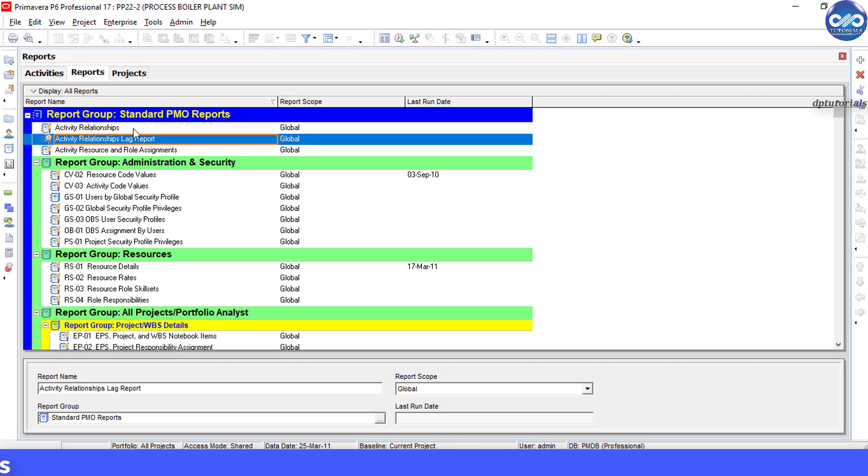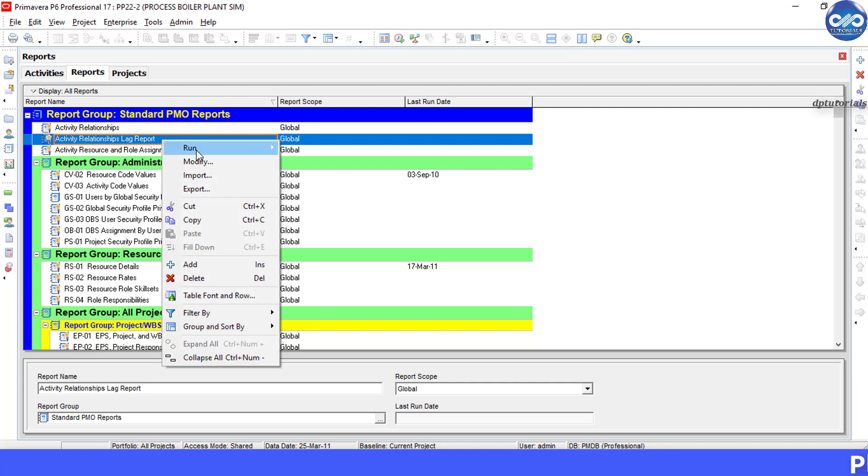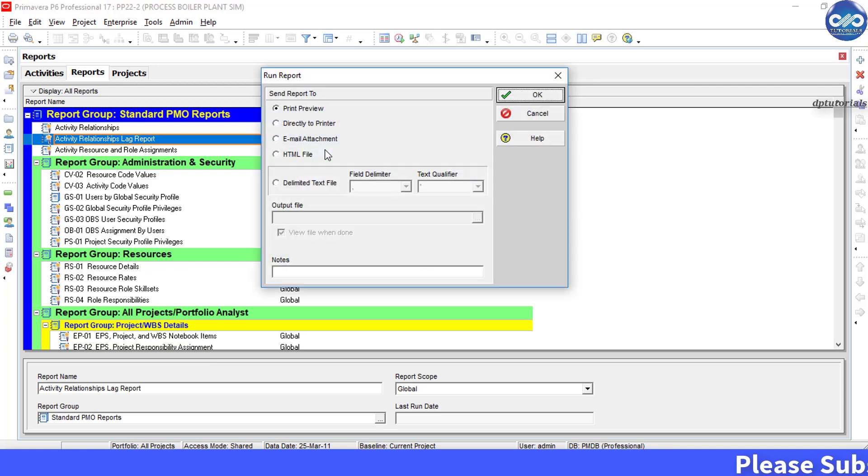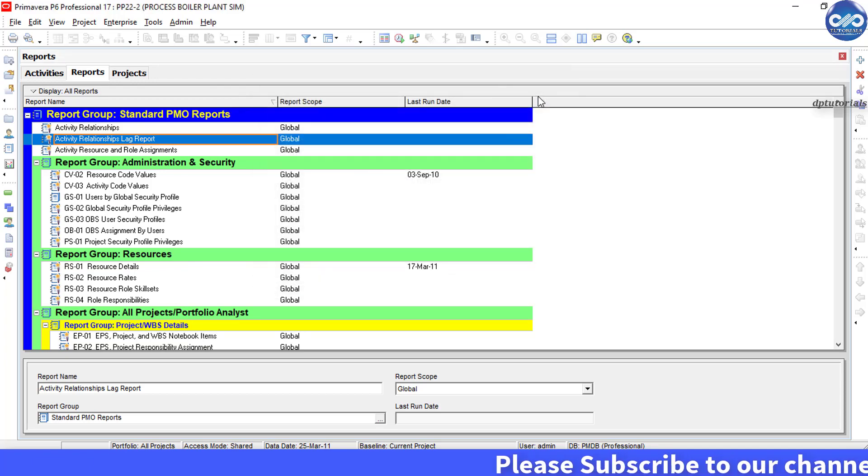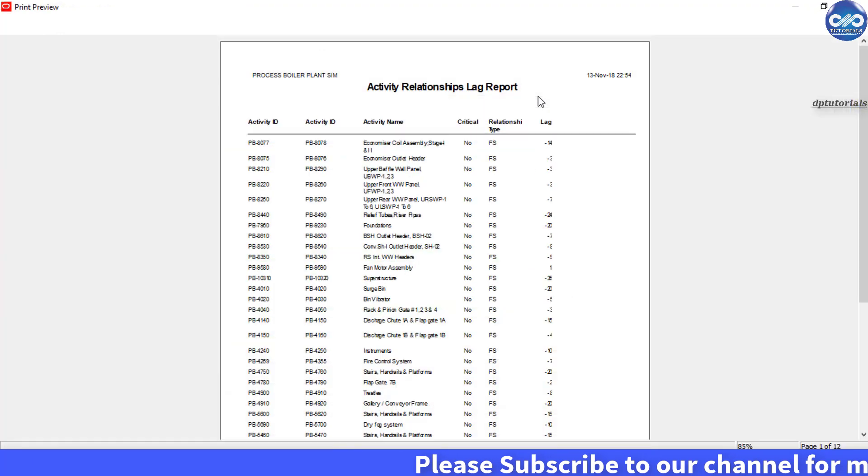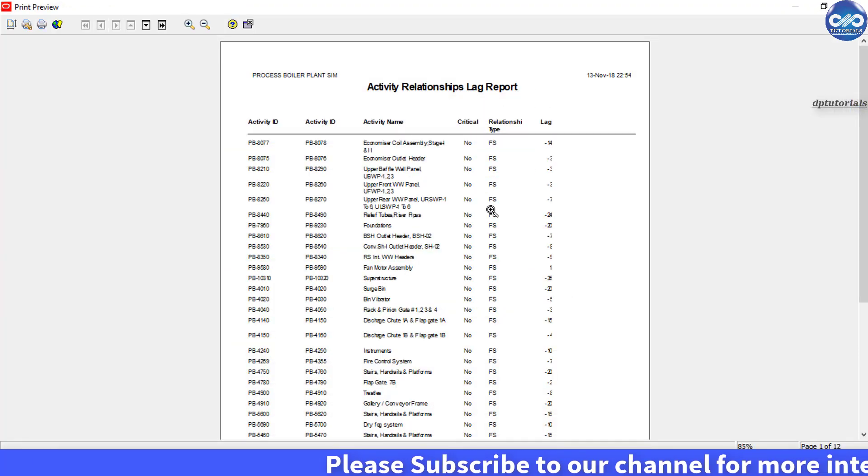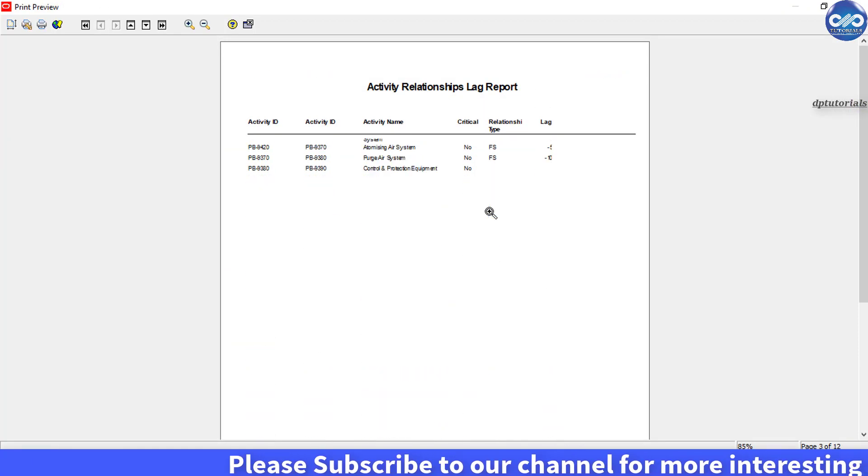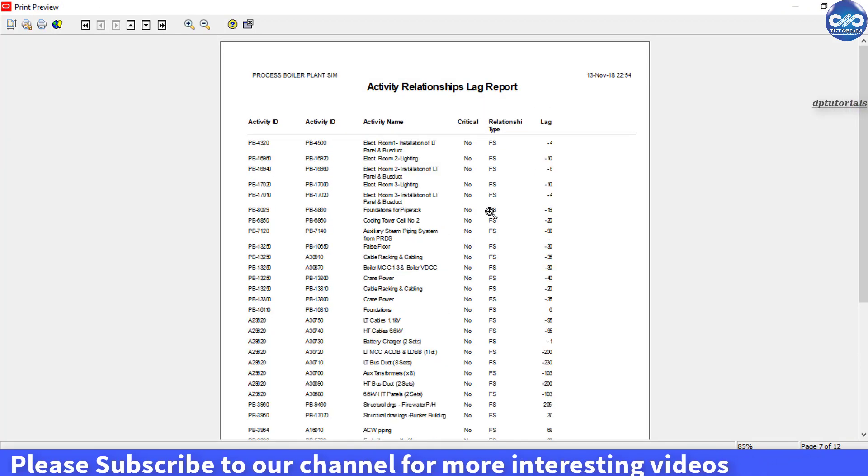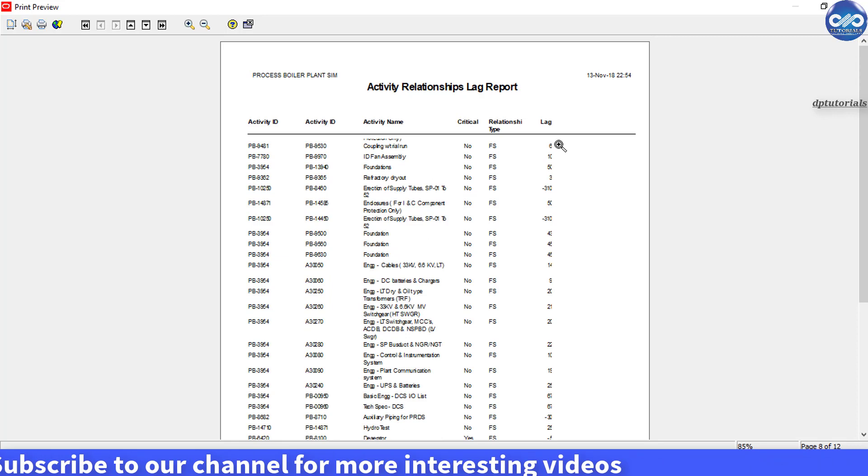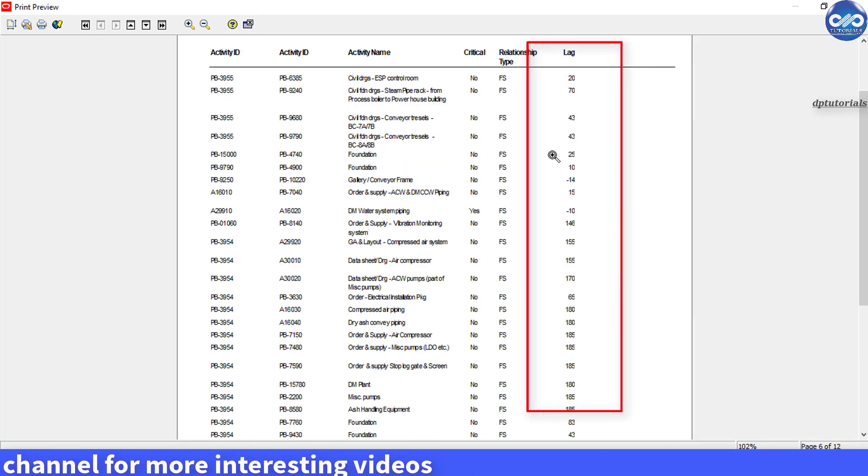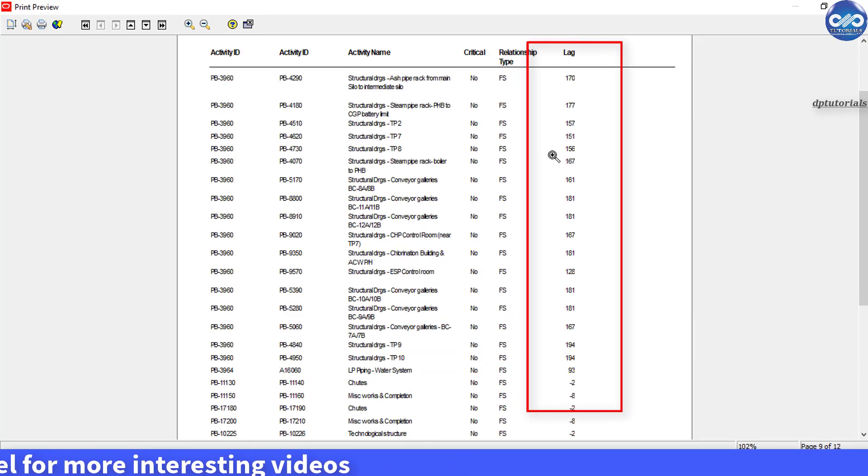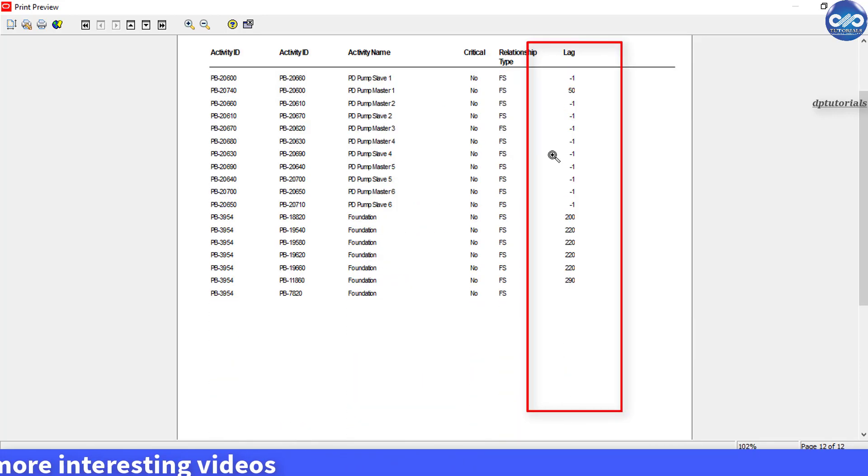Right-click on this report name, choose run and select run report. Now you can see that all the lags by activity IDs are shown here in detail like this.